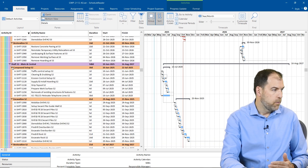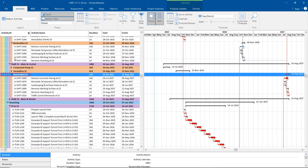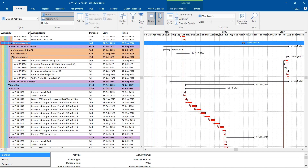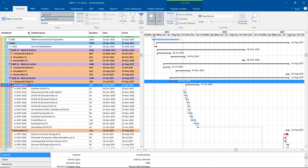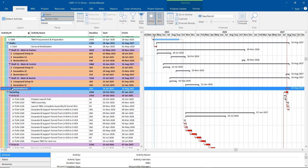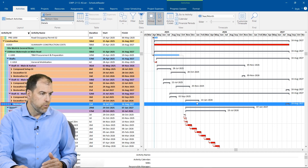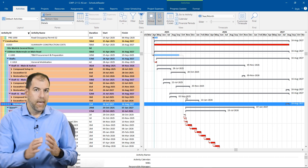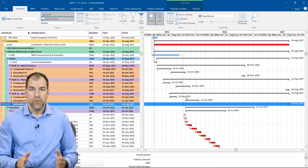One of the things we can do is roll things up to get a better understanding. So let's roll up our different sections like this. Now we can see each shaft's compound setup and excavation in a nice staggered view, making it easy to understand the bigger picture of the shaft work.